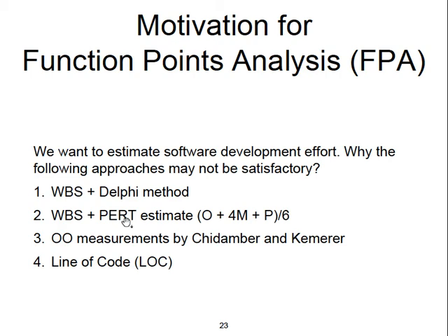So it depends on what kind of experts you have. For example, if all of your team members are very optimistic people, so they always make the mistake of thinking it takes very little time, then even their pessimistic case estimate will still be overly optimistic. So this will not be very reliable.